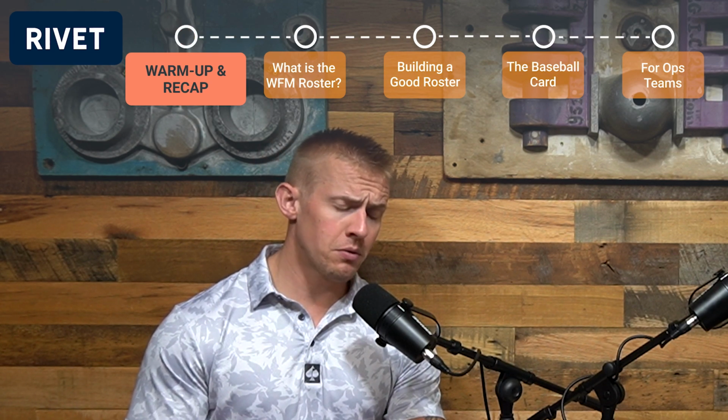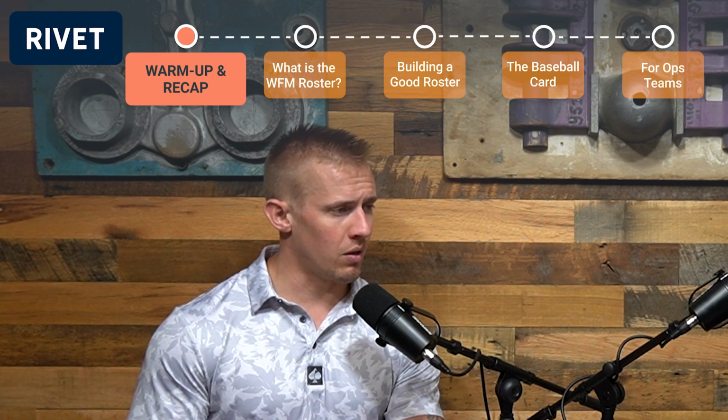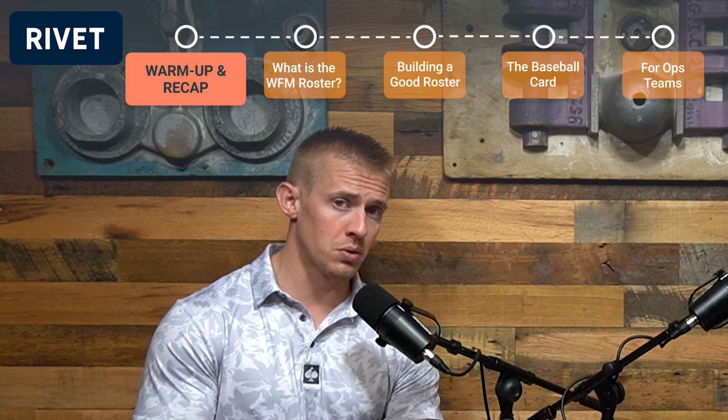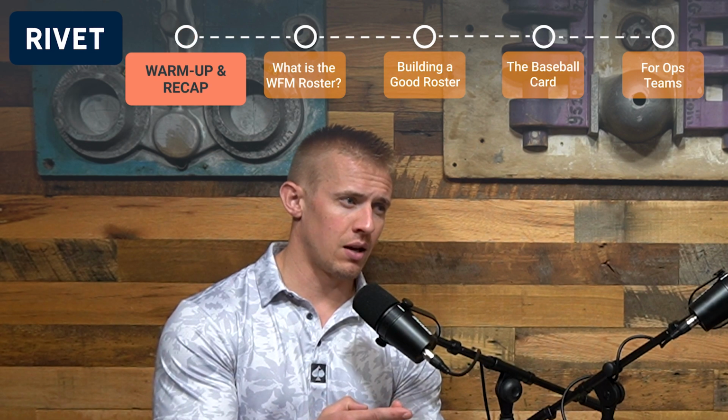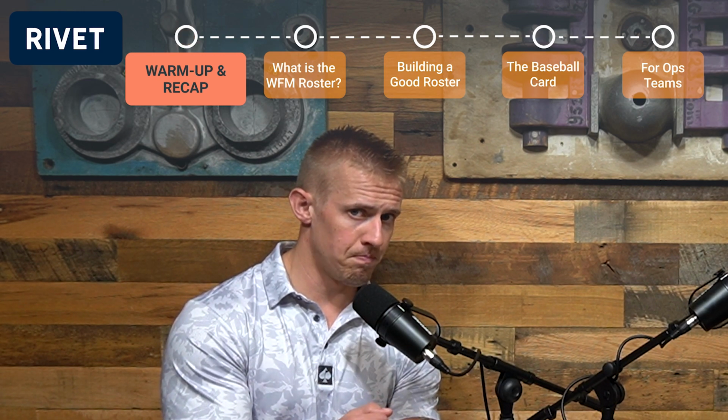But again, for those of you that are moving through this series with us, this second pillar out of 6, they are symbiotic. So we spoke last time about forecasting, how forecasting is truly 2 different concepts that are typically clumped into one, and it's not a good thing. But we helped break those out. Forecasting is really comprised of project labor planning on every job, identifying those needs across every job, and then accruing, summarizing, or rolling them up into an organizational forecast. And thus we have now, what are the commitments or the future needs against all of our people?